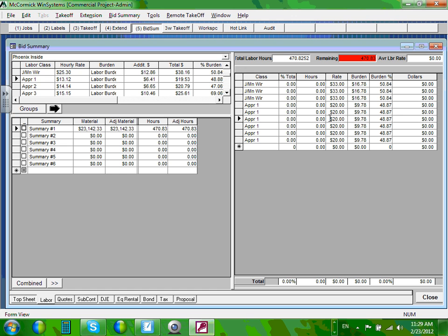So, Dan, who eats the cost of the burden? Is the burden cost the cost that... Insurance, health insurance, 401k, okay, unemployment. If I lay you off, I have to pay unemployment. That will be part of my cost, because there's the $33, guys.